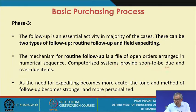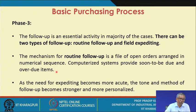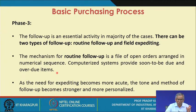Computer systems provide information on soon-to-be-due items — meaning within the next one week — and overdue items, meaning the delivery time has passed and the supplier is unable to supply on time. You need to identify those suppliers and take appropriate actions. At any point in time during routine follow-up, you must know how many items are in the soon-to-be-due category and how many are overdue.